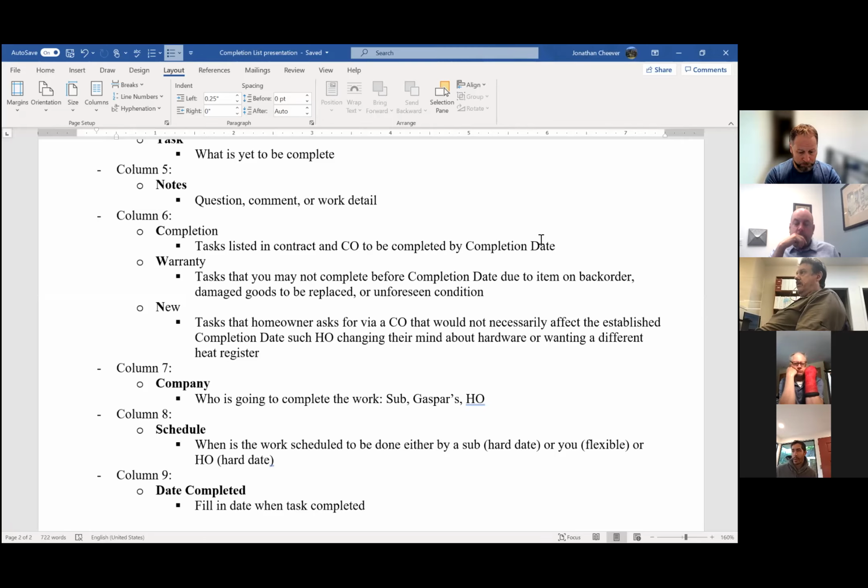So if you're not going to be complete in time, talk with your manager. Do we need to make a zero cost schedule change order so that we can accommodate everything that needs to be done? And the completion date might also help you realize, I'm not going to be completed by then. I've got too much to do and we need to talk about schedule again. So it's better to do this earlier, rather than a couple days before and be like, oh, I'm not going to hit my completion date. So that's part of why we're doing it 2 weeks out as well.